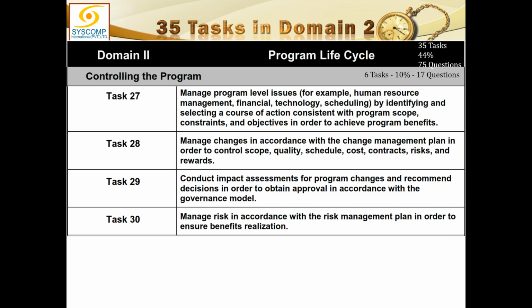Therefore, this change management procedure is not to be decided by the program manager. The program manager is going to request this change, and that is going to go to the program board, program change board, change control board, in order to control the scope, quality, schedule, cost, contracts, risks, and rewards regarding the program. So please take a note that here we are not talking about the change management in the project, because they are being handled by the program.